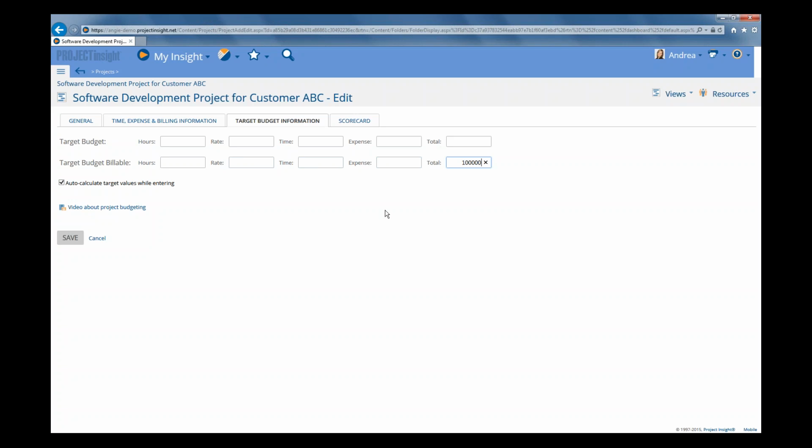And it's not really necessary because the detail won't come from these values. The detail is going to come from your detailed work breakdown structure, your schedule. So this is the place that you want to just record high-level target budget billable or top-down billable budgets. And you want to do that so that you can compare those with your detailed project budget later on. And, you know, it might be a little bit before those get developed, but that's the end goal.